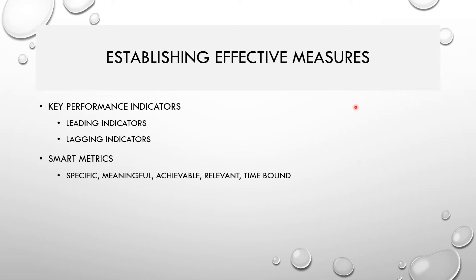Now let's look at the functions associated with the Measurement Performance domain. The first function is establishing effective measures — you need to establish your Key Performance Indicators. There are two types of KPIs: leading indicators and lagging indicators. Leading indicators give you a sense of the trending progress of the project. For example, a burndown chart is a leading indicator showing whether the team is progressing as desired for a sprint.